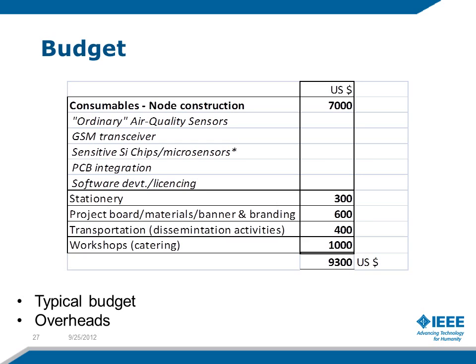For instance, if the NPO or NGO offers cost sharing in cash or by offering personnel time or catering or even a venue, such deepens the commitment. This is not required but helpful. Your budget may constitute of project supplies, transportation, stationery and overheads. Overheads could be between 10 and 25% and should be budgeted if required.